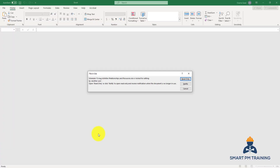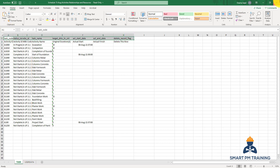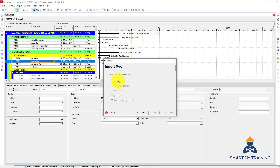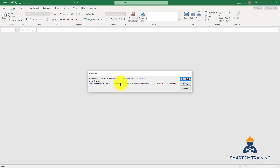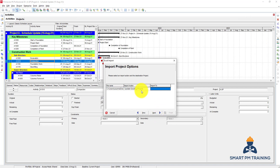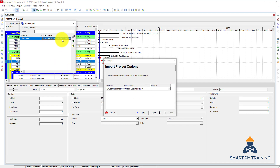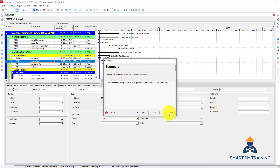When you select the file, Primavera checks the first row — it matches the code, so it detects this is the Task sheet for Activities. Note the file may be read-only because Primavera has opened it to check it. Select Activities as the subject area. You want to update the existing project — the one currently open, the 15th of August schedule. Click Next, then Finish.